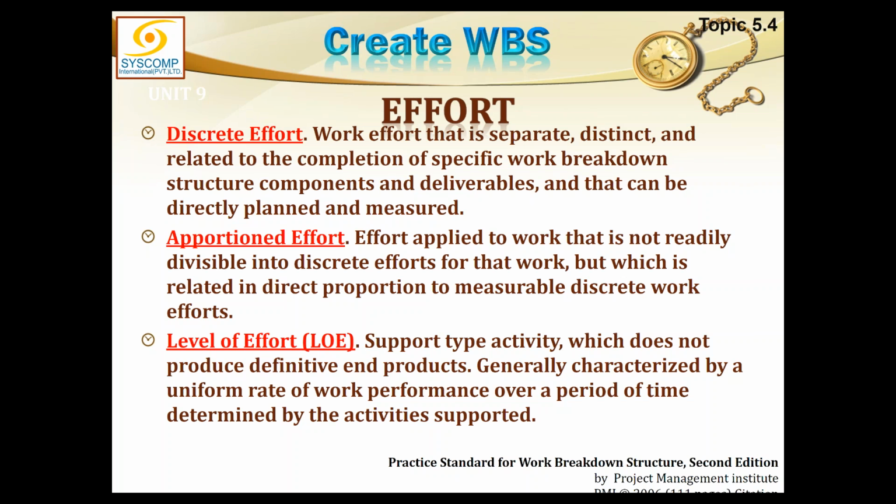For example, you are running this project of building a house, and throughout this project you are doing one activity, and that is the activity of project management. The activity of project management is consistent throughout the life of the project. If somebody asks you how much project management have you done, what do you respond? It is equal to the progress of the project. Naturally, this is just like apportioned effort, but here we are talking about the whole length of the project or the whole length of the phase. So just to give you these ideas, because these ideas will be used when you are trying to estimate the cost or time and things like that.